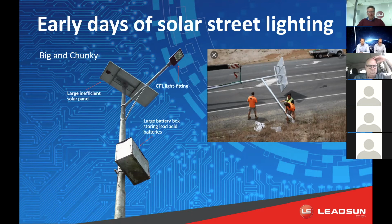And upon that investigation, I just remember at that point, everything was so expensive, as the lighting needed to rightfully comply with the Australian lighting standards. But after a lot of research, the only reliable product I could find on the market cost about $10,000, and that was just for one light. And also that was going to take about 12 weeks to prepare and get it to site.